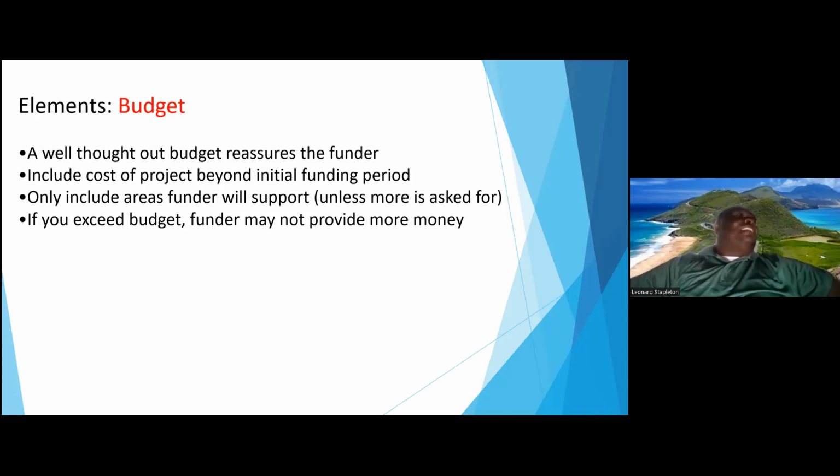But the funder that gives funding for the solar panel does not give funding for the repair of a roof. Now you have to show the funder for the solar panel that the funds you're going to need to repair the roof, or to put the roof in such a position that it could hold the solar panel, you're going to get from X or Y or Z. Because here, they may not want to give you the solar panel to put on a compromised roof.